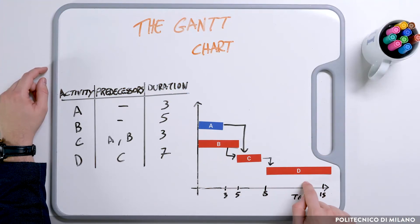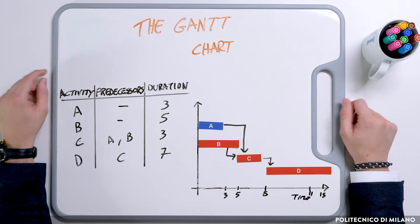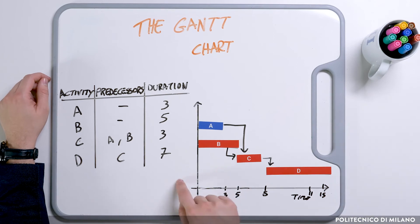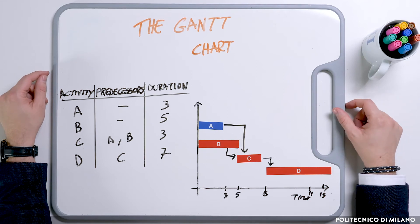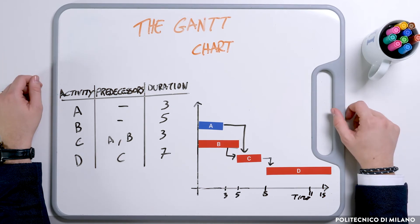B, C, and D are defined as the critical path — the activity chain that runs from the beginning to the end of the project, defining the project duration, which in this case is equal to 15. Please pay attention to a very relevant detail: this criticality is considered only regarding time. A critical activity is not, by definition, more important or more relevant than a non-critical activity. We are simply saying that from a time perspective, we should highly monitor these activities because there is no slack.